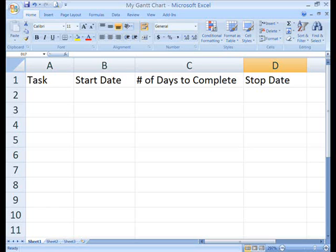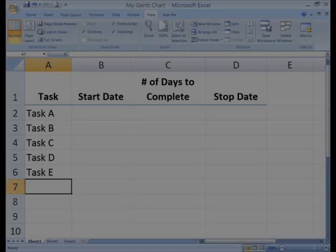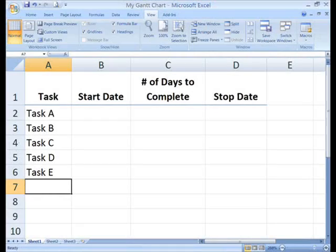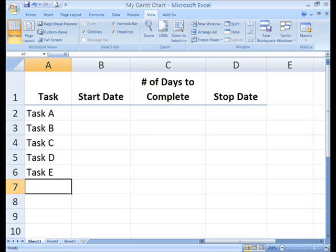Type in the column headings across the top: task, start date, number of days to complete, and stop date. Next, type in the generic tasks in column A, tasks A through E.